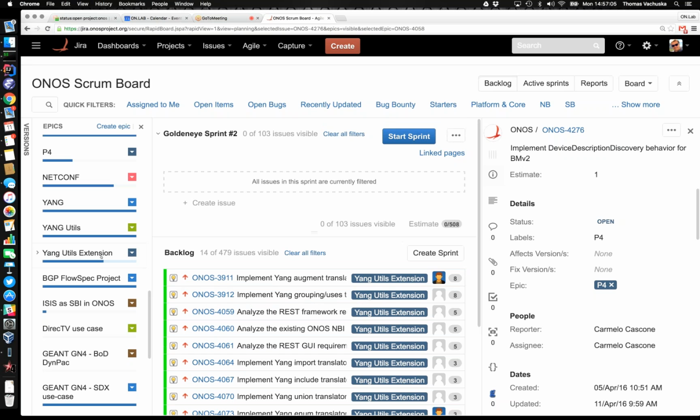Okay, currently we intend to work. Okay, you want me to update the stories, right? Well, it would be better if you can do that during the sprint planning rather than later, because if you do it later after the sprint starts, it creates kind of a funky burndown chart. Okay, sure. If you can just take a few items that you plan to do this sprint and simply drag and drop them onto the existing sprint, that would work best. Okay, I'll do it right away.